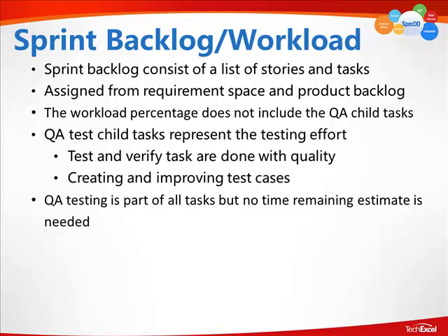Now, if you recall, the QA child tasks are the items that the QA floaters need to be working on. These are the members that were assigned from the QA team, however, they reside within the development team in order to help with the unit testing, the small testing of the tasks that the developers are writing. So the workload percentage here does not include the QA child tasks. It basically does not include the QA floaters and their workload.